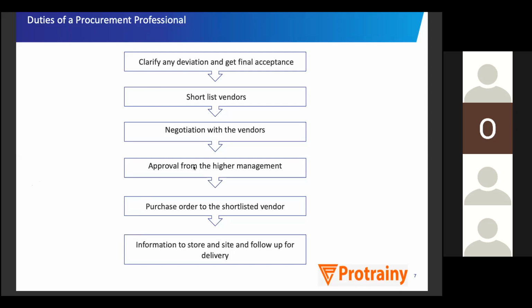If you are purchasing aggregate, what is the source location of the aggregate, from how far is it coming, who is bringing it, what is the crushing cost, what is the transport cost? All these factors should be considered: I want this price for 1 ton of aggregate, these are its factors, I have considered this much money in each factor, and according to that it comes to 800 rupees per ton, but the price you have given is 850 rupees per ton, so you will have to reduce it by 50 rupees.